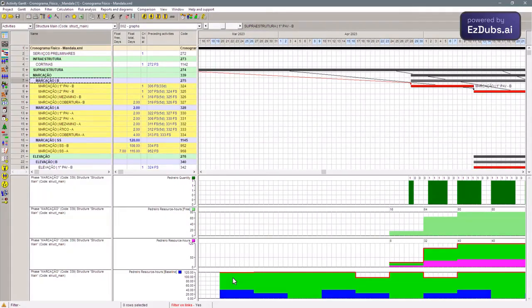Bricklayer hours available. Green is paid in salary, blue is the reason it exists. So we have more hours available than hours worked. With the optimization we made, eliminating the total slack from the calculation, adding delay, we were able to remove from the baseline what it was, the value of hours, and consequently the value of money that was used for nothing.